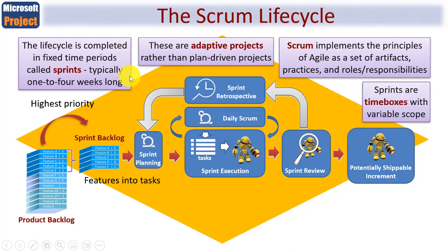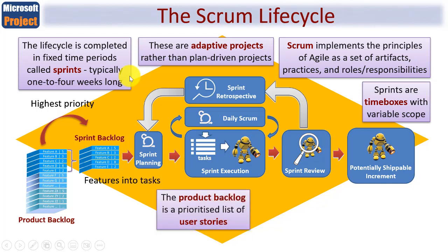What differentiates sprints and time boxes from traditional projects is that with a traditional project you tie down scope and then work out the time needed to carry that out. With sprints or time boxes, which have a fixed non-negotiable endpoint, what is varied within each sprint is the scope itself.